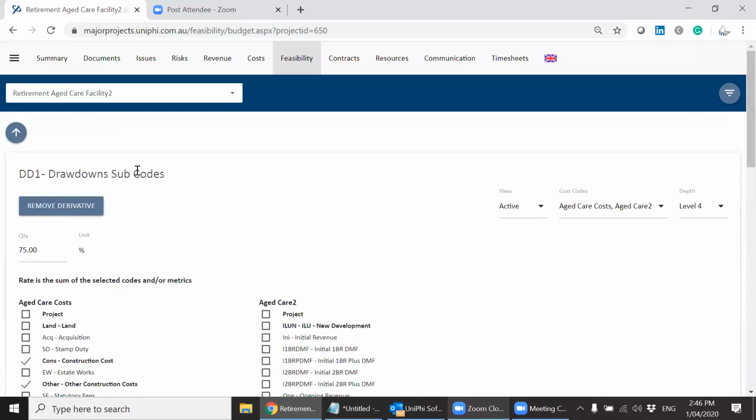And what that means is that when I do my estimate for costs and phase it out through that model that I showed you before, the funding is automatically updating dynamically every time I change a number. And when I look at this, which isn't anything to do with NPV, it is something you want to give to the banks to say, this is when I'm going to come to you for money and this is how much.